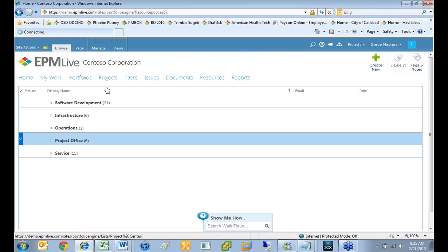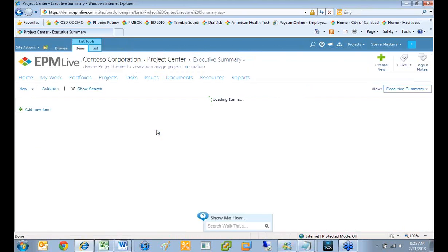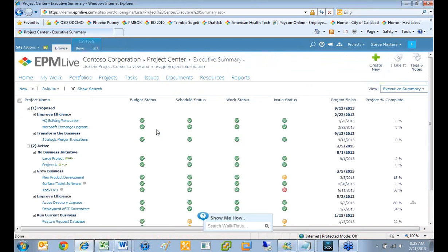So then once you have your resource plan within the system, now the system knows this is how much resources we're expecting to use for this project. They're no longer available to be used for other projects. It's going to show now if I went to another project and I opened it up that those 2 people that I gave all that work to are no longer going to be available for other projects in that time period anyway.